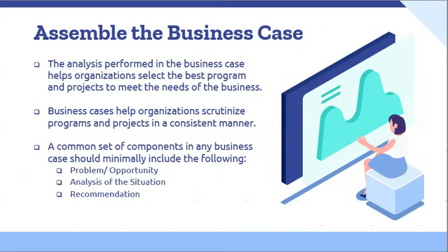Include why it is recommended and why the others are not. We have to summarize the cost-benefit analysis for the recommended option. Include the implementation approach, including milestones, dependencies, roles, and responsibilities.